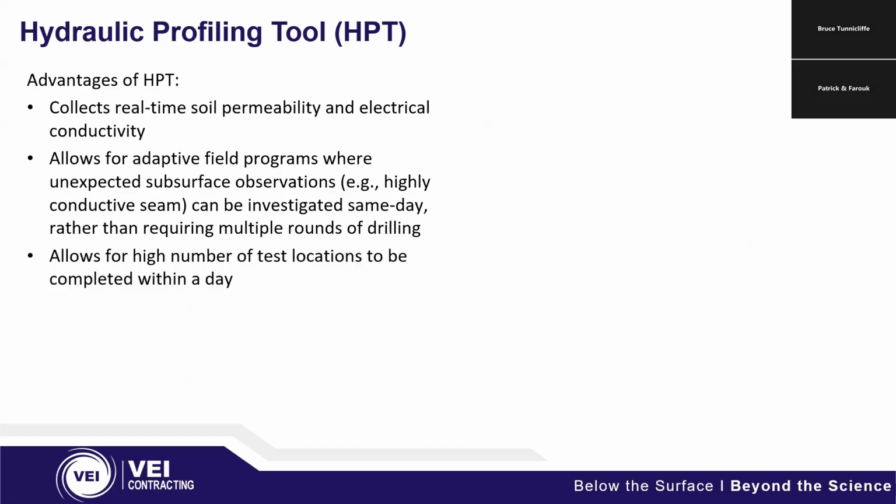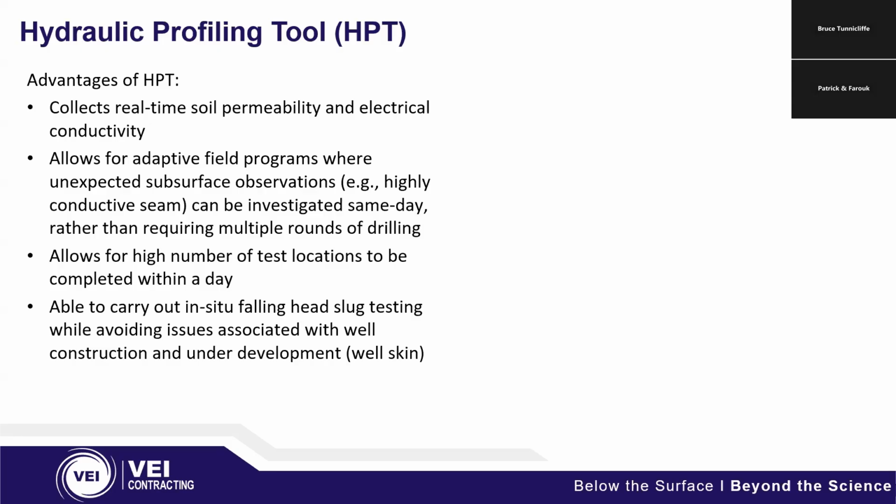And it allows for a high number of locations to be done in one day. The depth that you have to reach, and access, will depend on how many you can get done in a day. Typically, if we're doing maybe 20-foot locations, 25-foot locations, you can probably count on 5, 6 of these done in a day, maybe even more, depending on how well site access is for that particular location.